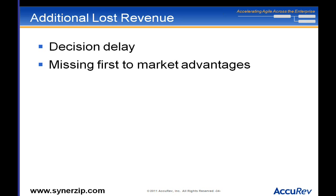You can also assess the time frame of value. One feature might be valuable for years — it's a huge differentiator and nobody else is going to catch up in this area for a long time. Another feature: a competitor is going to be offering that in six months, so the time frame for it being a differentiator is much lower. At the end of the day, that's what your product management group is going to do for you.